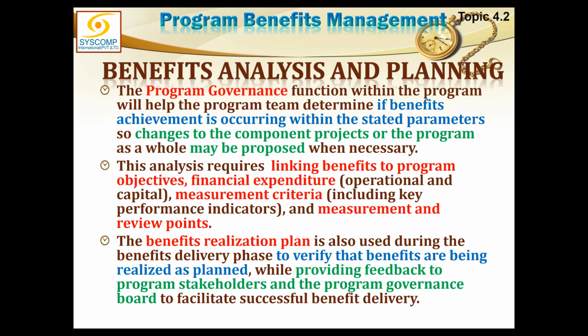So this analysis is the in-depth study which is not only analyzing all the benefits, but it is toying with the idea of various approaches, which is the best approach to do it, and then how much funding is required for each project, how the progress of each program will be measured, and when and how they will be reviewed. The benefit realization plan is also used during the benefit delivery phase to verify that benefits are being realized as planned, while providing feedback to program stakeholders and to the program governance board to facilitate successful benefit delivery.